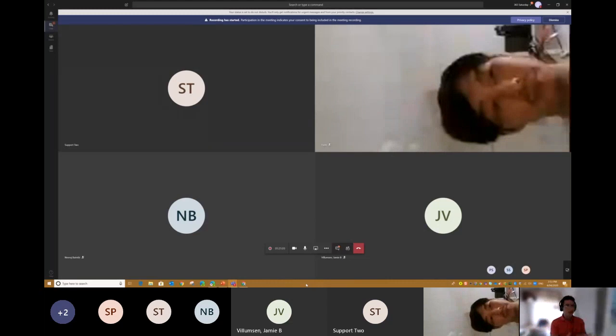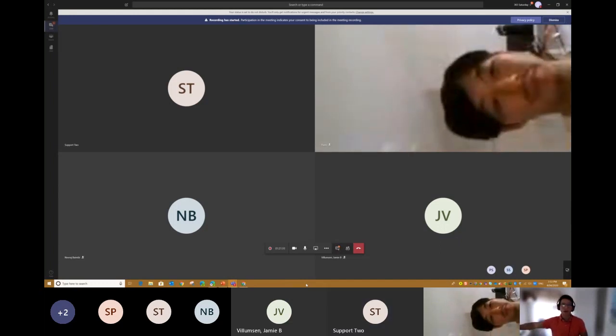So that's why the envisioning that I mostly run now is done just before the project, so that at least we have a shared understanding of what we want to build, and then we run the first sprint where we build stuff, but we continue prototyping in a sandbox environment there, but at least we have the basics right, if that makes sense.